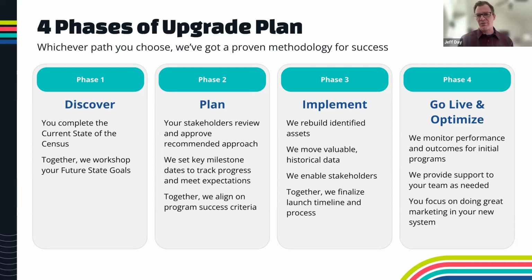The first one's the discovery phase. We've been talking about it. Take an assessment, assess what you use, what you don't use, what you want to migrate as a whole, what you want to refresh, how many assets you have, how many hard assets like emails and downloads and imagery versus campaigns and some of the setup stuff. You want to do that discovery so you know what you're dealing with, but it's also an opportunity to say, listen, actually 60% of this stuff we're not using anymore, so we don't need that.